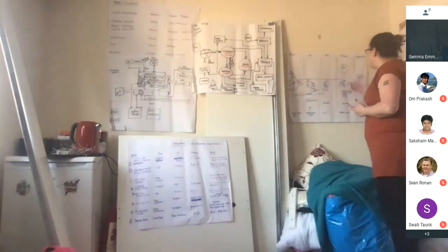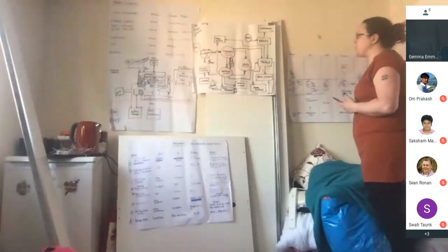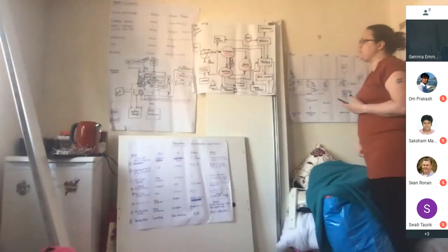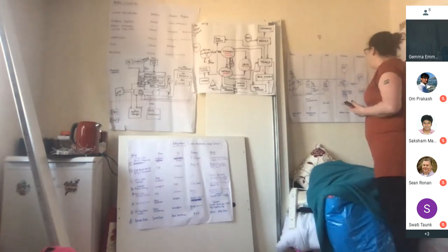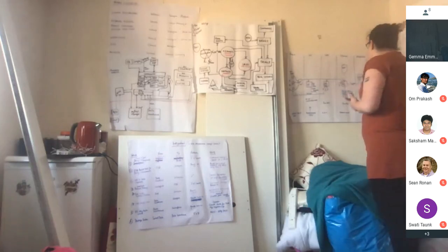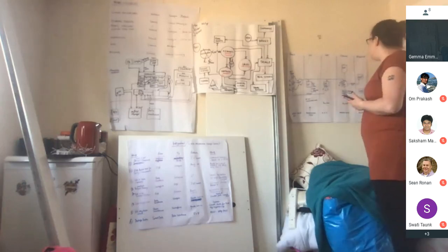At that point, we would complete our data migration, so all of the history for the last 6 months, medical history, patients, assume comes out of my trial manager. We will produce CSV files, which will then use the ETL capability of our MuleSoft and use that to update the full sandbox with data and test again, so we can run all our automated tests and check how it's performing with that volume of data.